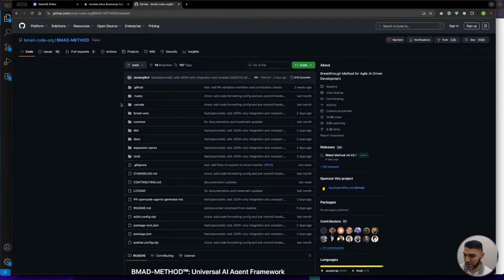These are the success factors. So this is how you decide whether you have implemented something correctly. This is how you would need to test it in order to validate that it works properly, before it can move on to the next task, right? So doing all of this methodically, one item at a time, will make it so that the agent, that is the developer who is going to be building, only has to worry about a single task at any given moment. And if they're very small, you can of course have it do multiple tasks one after the other.